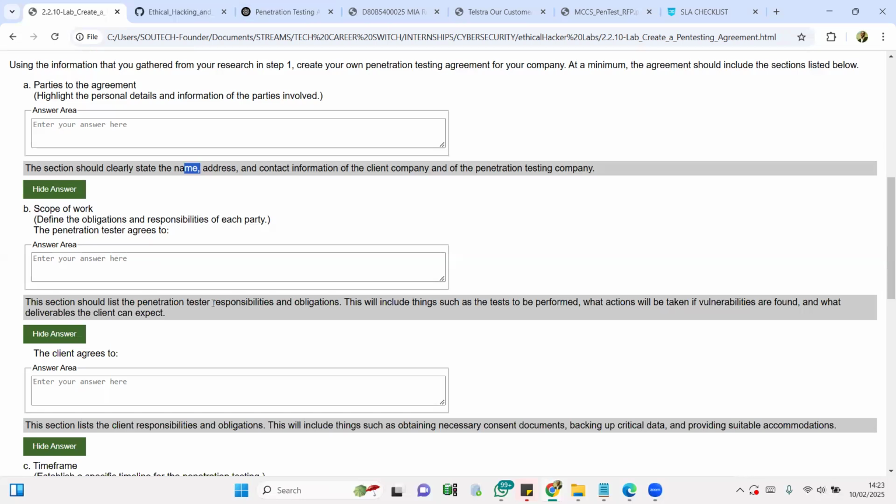This is still part of the document that we look at when we see that our client is getting into a scope creep. Scope creep, I mean, when the client is asking or demanding far more than what was documented or what was agreed. Because if we don't agree on it, if we don't sign off on it, then it's not binding, it doesn't hold. So you need to understand that having a document like this frees you from quite a lot of stress.